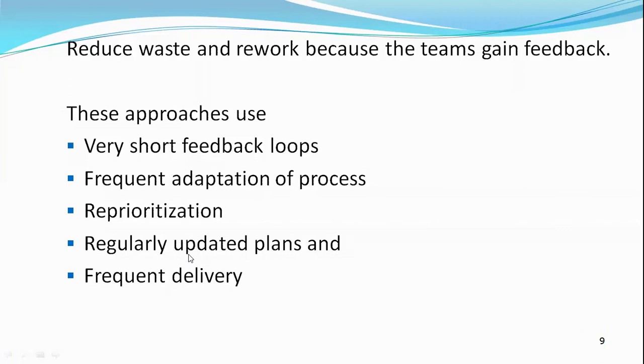And you can regularly update your plans, because you are going to build in small chunks and there is going to be frequent delivery. As I said, the first one or two functions of the banking solution we may build and give to the customer. Let's assume we build only the facility of checking the bank balance and downloading the bank statement. We give that to the customer and they use it. Then the next chunk might be making and receiving payments. So the entire project is built in small pieces, and we have frequent deliverables.